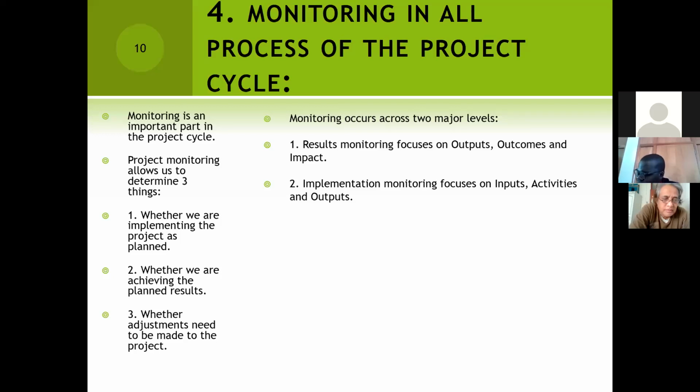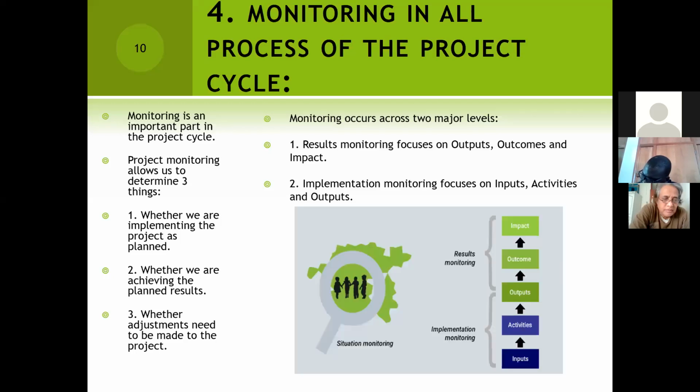So implementation monitoring looks at inputs and activities, whereas results monitoring looks at outputs, outcomes, and impacts as expected.